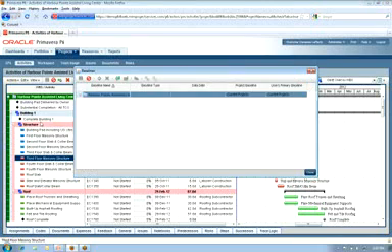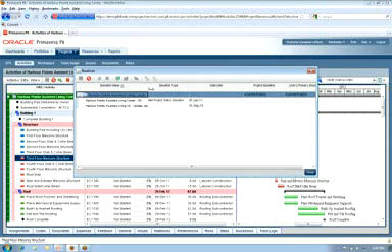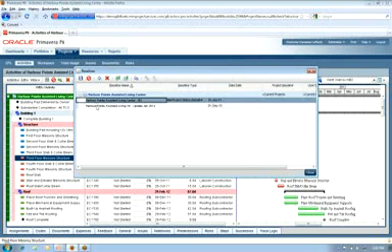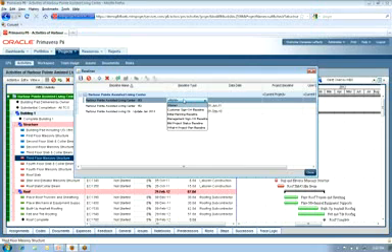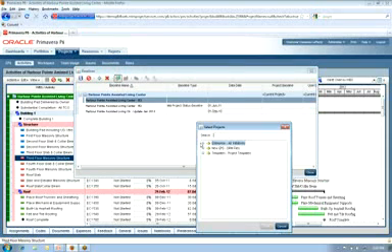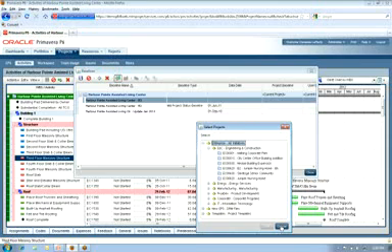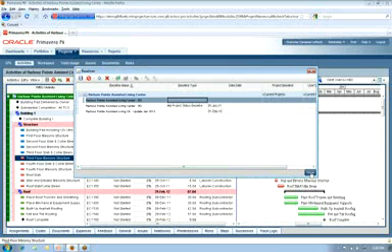I click on Define Baselines, and it brings up a Maintain Baseline dialog box, very similar to how it did on the desktop client. It's got my different baselines listed here, and then it's got columns for the different categories and types. So if I wanted to add a baseline and take a snapshot, I press the plus button here, and it just creates one there. Baseline types, data date, etc. And I can delete baselines, and I can also convert the baseline from a current project, where it brings up my EPS right here, and I can select the project I want to convert as a baseline. So it's very similar to the process I just showed you. It's just slightly different where to navigate to.